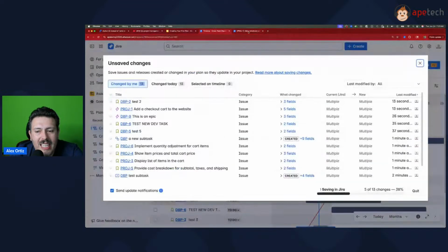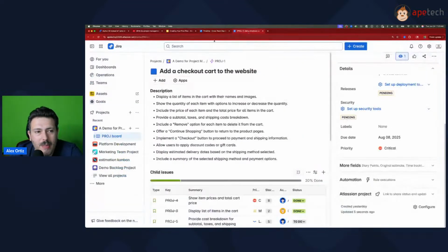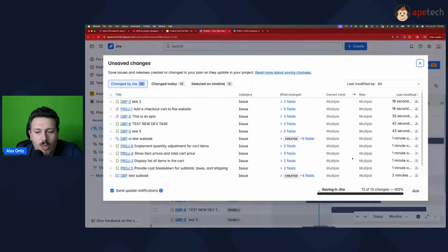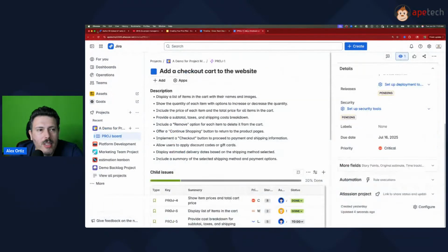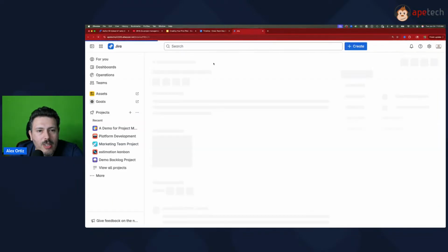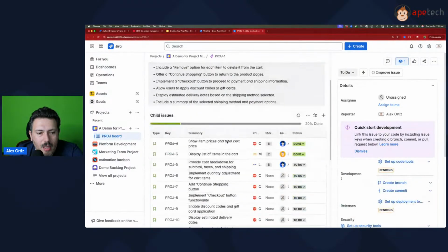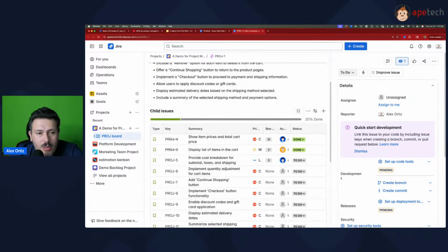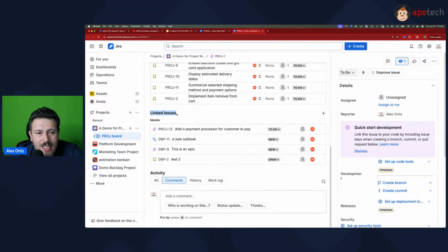Essentially inside of Jira, I'm going to open up my Jira item here. I'm going to do a quick refresh once this gets published. Okay, there it is. So I'm going to refresh inside this Jira. I'm inside my Epic. Notice that below my child issues, I have my linked issues. And notice that I now have my blocked conditions. Everything we've been doing, all that attaching, all those connecting lines that are all red, we are simply adding a blocks relationship to those work items.